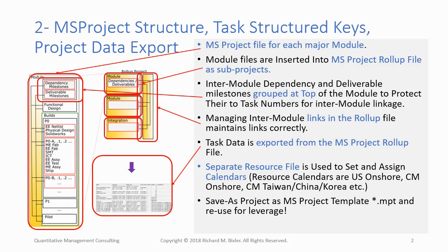Remember, only assign one placeholder resource to each task, the resource whose calendar will control the task, so that task duration will not be inappropriately modified as if several real resources are involved. This scheme only covers calendar holidays, not work leveling.